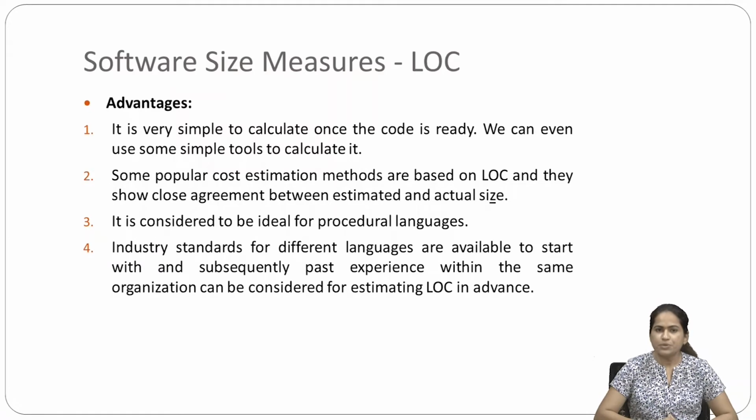It is considered to be ideal for procedural languages, and industry standards for different languages are available to start with. Subsequently, past experiences within the same organization can be considered for estimating LOC in advance. Similar projects, if you have done in the past, then you can consider that for estimating the size for the new project. These are the advantages.